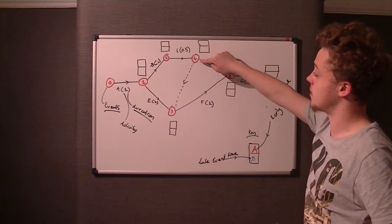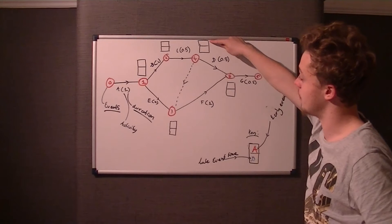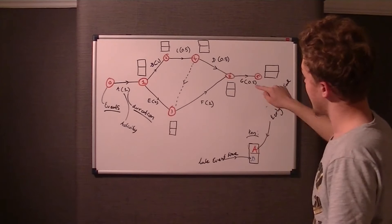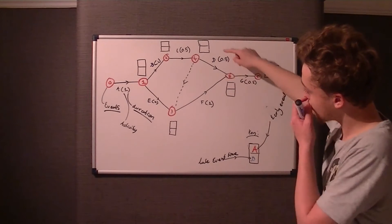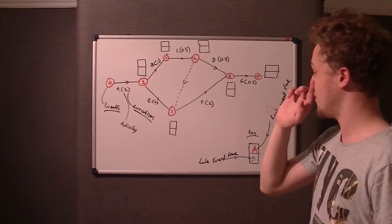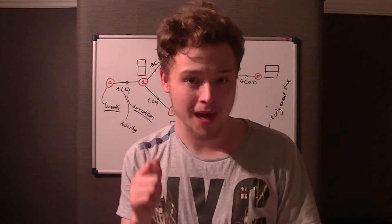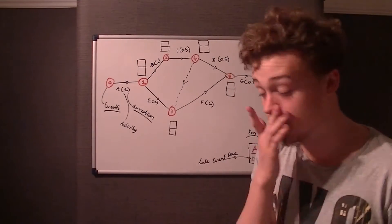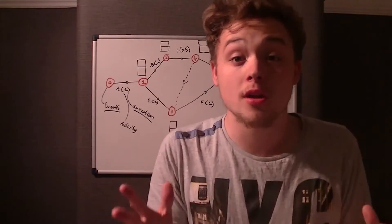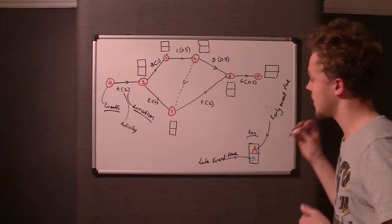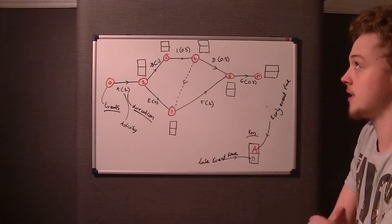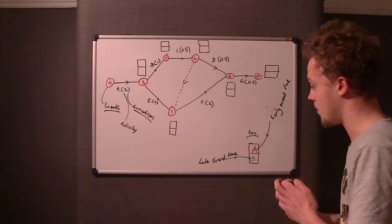For example, the two numbers associated with event four: the Early Event Time and the Late Event Time for event four — if they are the same — and similarly for event five — we say it's a critical event. In other words, we can't delay it happening. That is essentially when something called the float is equal to zero.